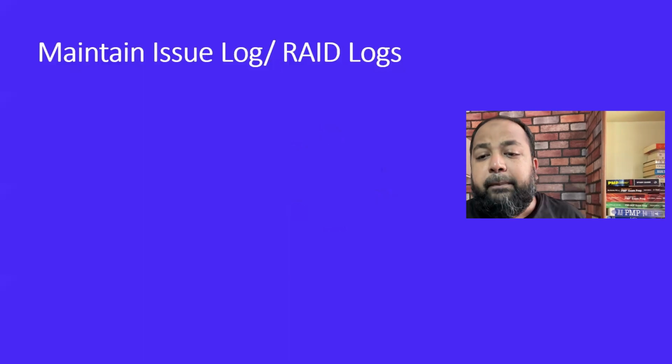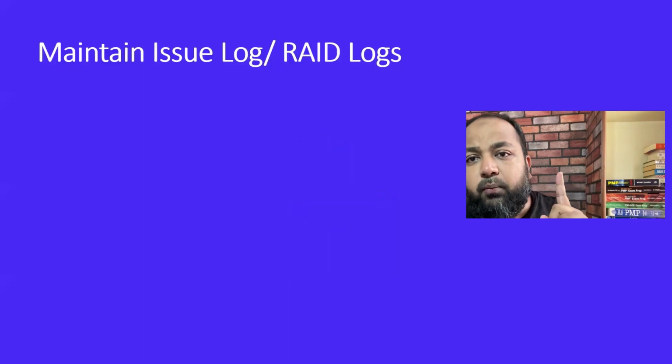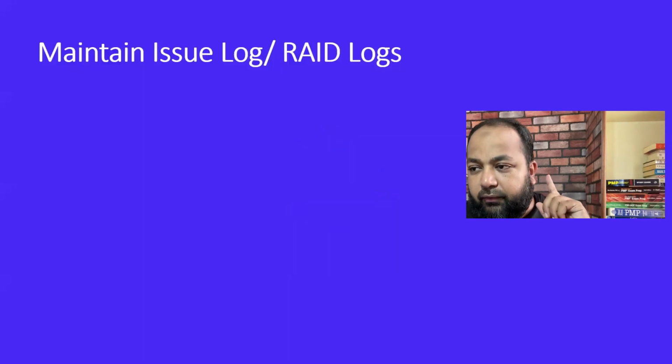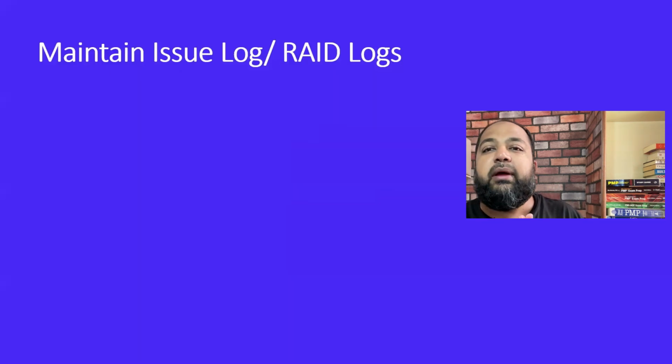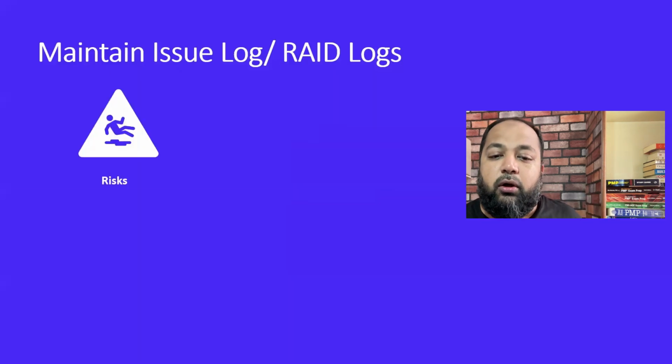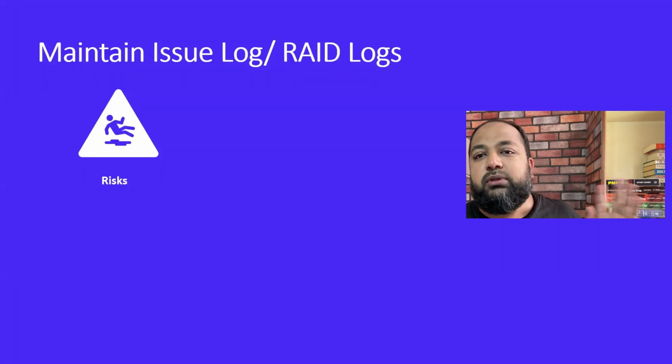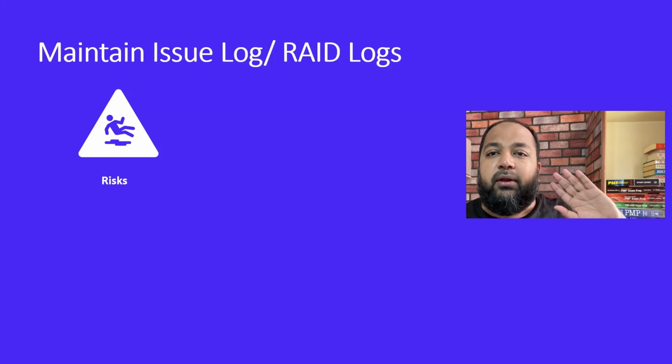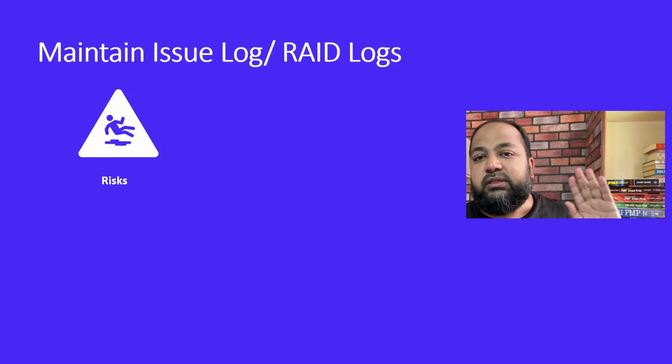Then maintain the issue log and RAID logs, very very important when you're working on a project. A very important part, every project manager should maintain RAID logs. RAID logs are where you want to capture and identify what the risks are, what the risk mitigation plans are, who's the owner, what is the impact, when are you going to close the risk, what is the status of the risk.